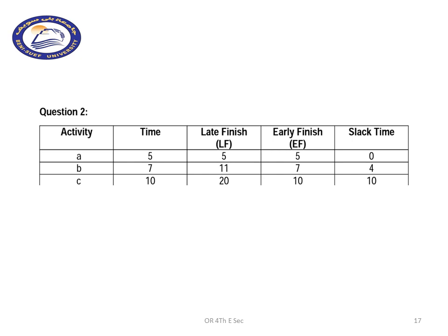The late finish for activity A from the network is 5. It is written at node number 2 in the circle above that node. Or by calculation, the late finish time for activity A is 0 plus 5, which is the time given.